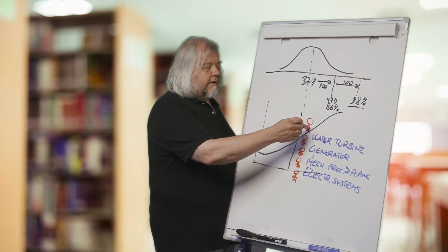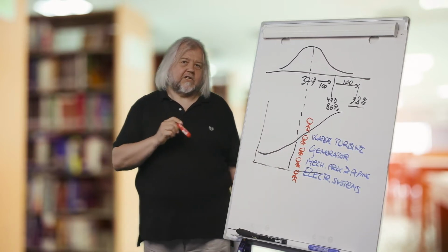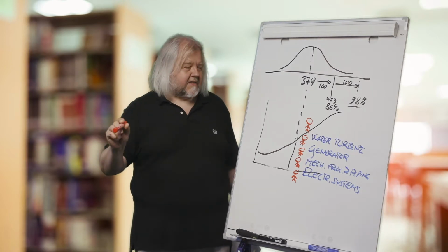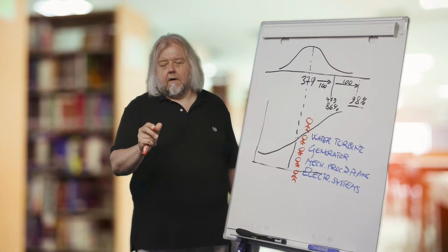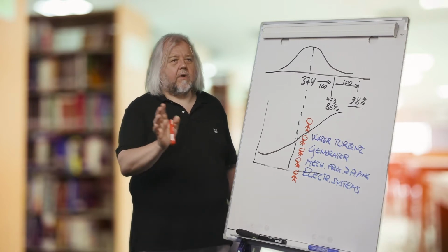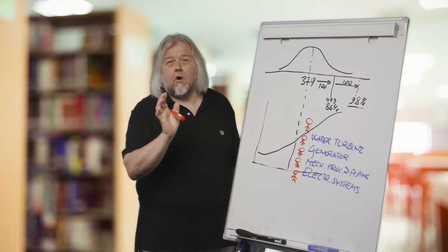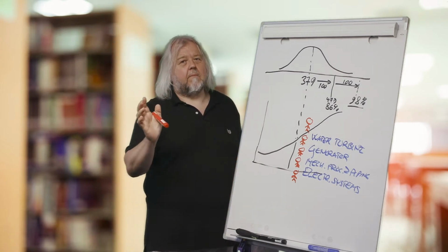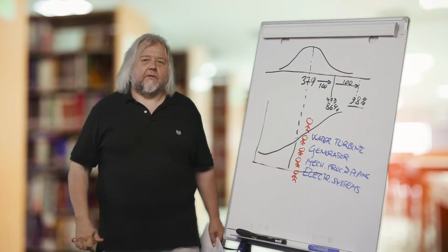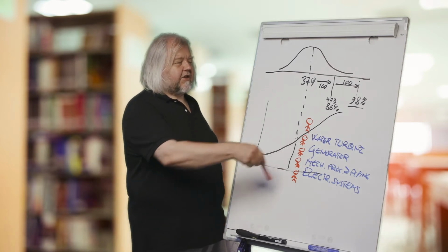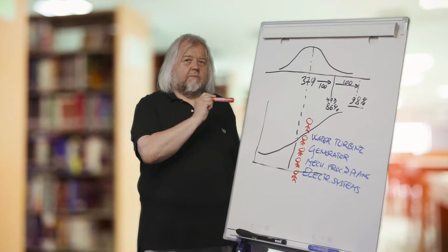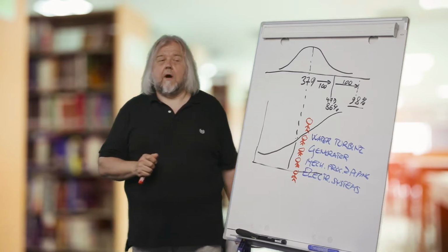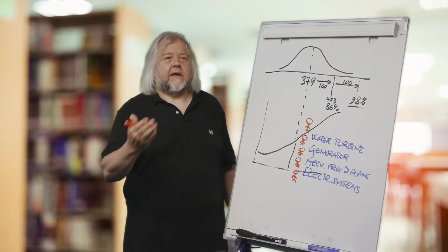And the business unit director made a decision in that session that we cannot take this kind of risk, but we must select a more expensive water turbine, and we must be on the safe side of knowing what it's going to cost. And it was not only the cost, but all these potential quality problems. To avoid these kinds of quality problems, pay a little bit more and avoid risk. That was actually the learning of that session, and decisions about how to mitigate the risks and how to avoid, in this case, a non-qualified water turbine supplier were made in that meeting.